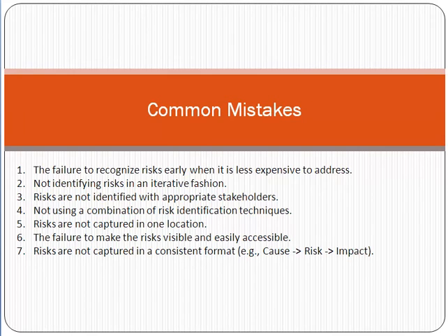We don't follow the iterative manner, which means we are not reviewing the risks frequently, like after every week or every 2 weeks, reviewing the list of risks and then updating the list. Risks are not identified with appropriate stakeholders, or they are not involved properly. Proper risk identification techniques are not used. Risks are not captured in one location, which is a failure to make the risk visible and easily accessible.